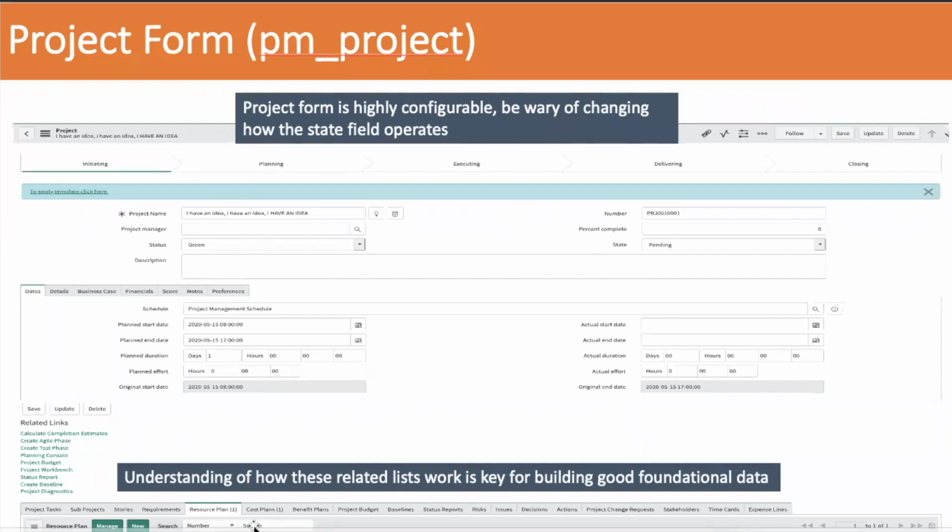So when I do it, I like to go through all these at the beginning and say, hey, what are you capable of implementing right now, right? Obviously project task, and maybe some requirements, maybe some risks or decisions or issues. But if they're not 100% ready to delve into those and define what the outcomes are, I just go in and hide those lists. I just take them out from the picker until they're ready.